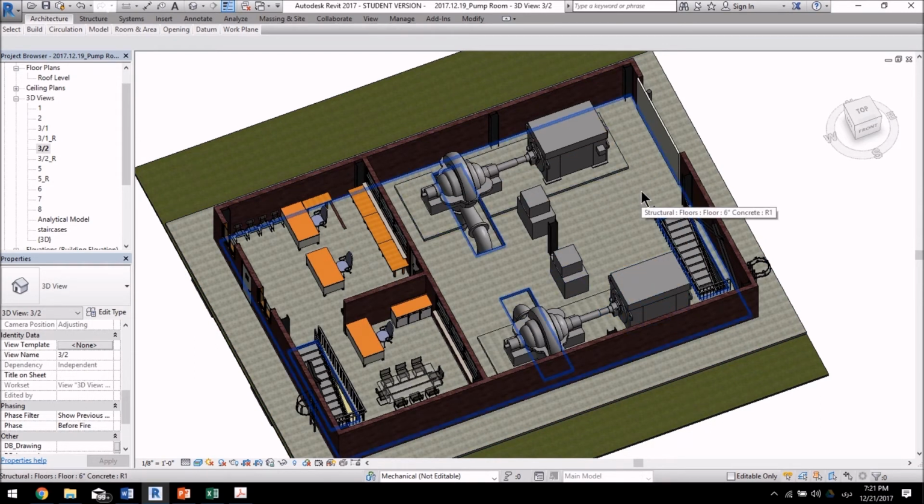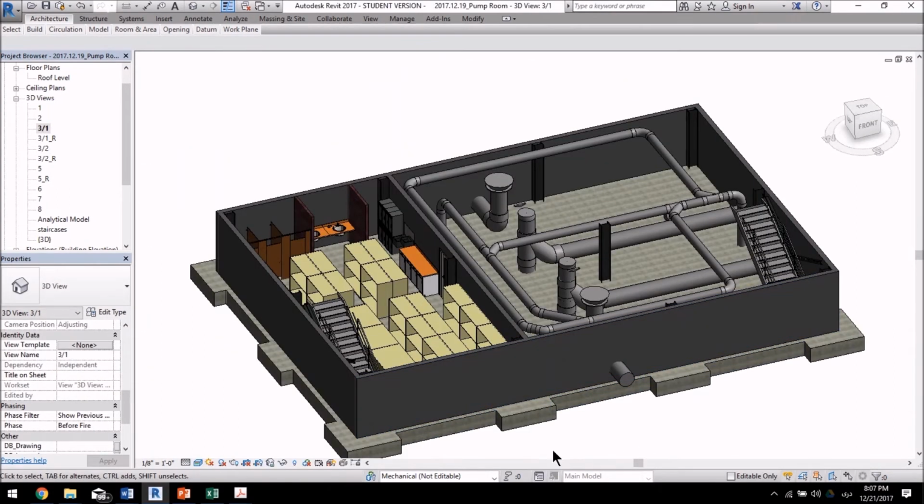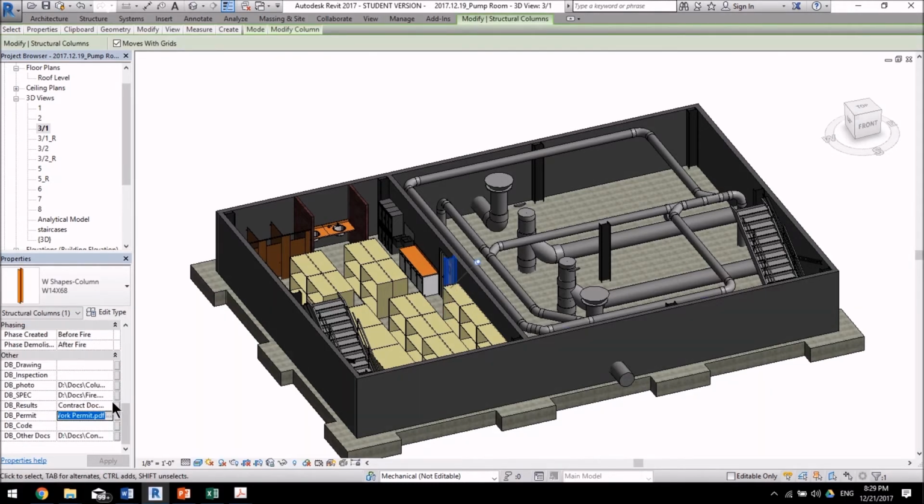time of the incident. The fire incident occurred inside the storage room in the basement, as I mentioned before. According to the NFPA 51B, which is the standard for fire prevention during welding, cutting, and other hot work, the storage room is a permit required area, so our hot work operators or our welders had to receive the hot work permit before starting the welding.